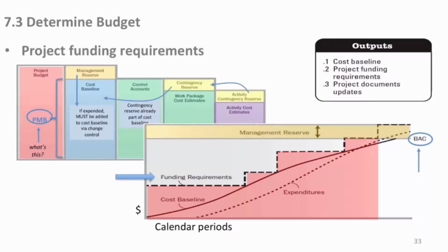And then you would put some contingency reserves on top of that for more unknown or known unknowns. And the total of that becomes your control account as they aggregate up into that. Okay, so that's how those aggregations work. So now we're at the control account level that includes all of our cost estimates and all of our contingency reserves for known unknown risks.